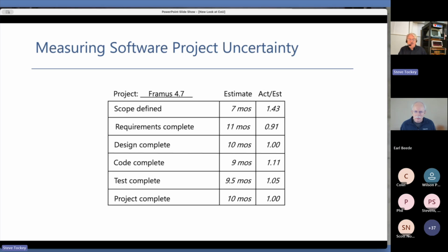Well, okay, so if I'm doing a fixed budget project, then I'm not doing things over time. I'm doing things over money. And so when I have spent this much money, I thought I was going to get this much amount of work done. After having spent that varying amount of money, I think I'm going to get this amount of work done. At that amount of money spent, and how much did I actually get work done when I spent all the money?